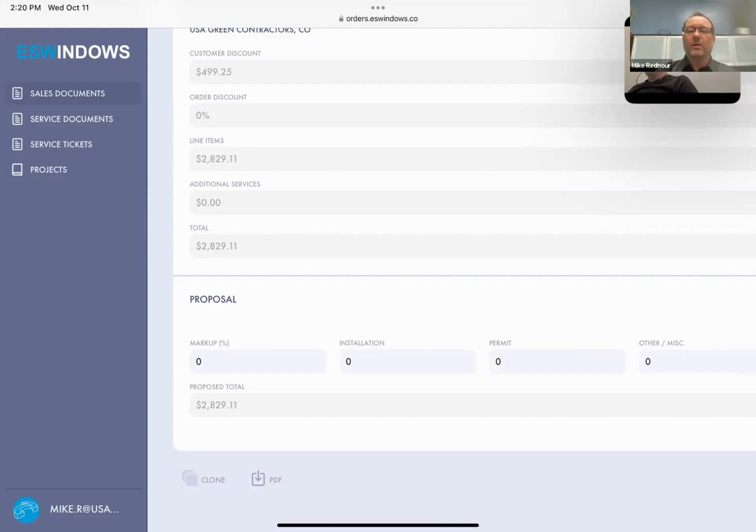How do you know that? Well, always feel safe to assume that it's about 2 to 3% of the job. So on $150,000, $5,500, 3%. Now, if it gets down to negotiating and that permit cost is killing you, then obviously you can take it away somewhere else, or increase your value to show that $5,500 is worth it.